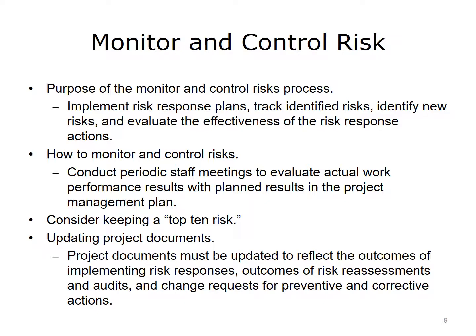Monitoring and controlling also extends to risk. Track identified risks, identify new risks, implement risk response plans, and evaluate the effectiveness of the risk response actions. Use periodic staff meetings to ask your team to help you identify new risks, review the results of risk audits, and review performance measurements against actual performance. Updating project documents, including your risk management plan and risk register, will allow you to track risk response activities and change requests for preventive and corrective actions.